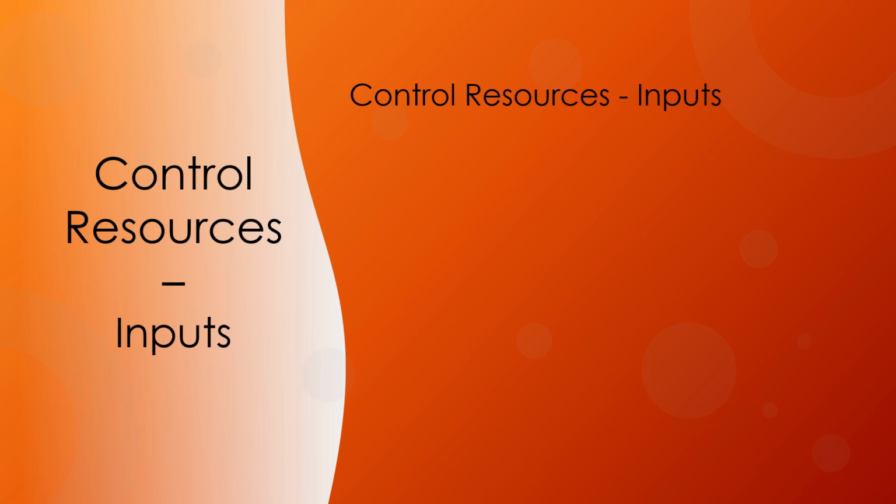The set of outputs to this process include work performance information, change requests, components of project management plan updates such as resource management plan, schedule baseline, and cost baseline, project documents updates such as assumption log, issue log, lessons learned register, physical resource assignments, resource breakdown structure, and risk register. Let's discuss all of them.